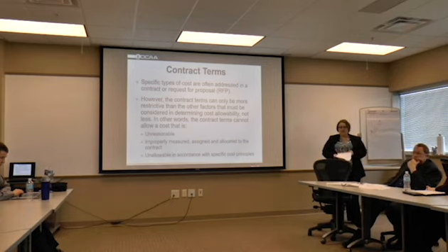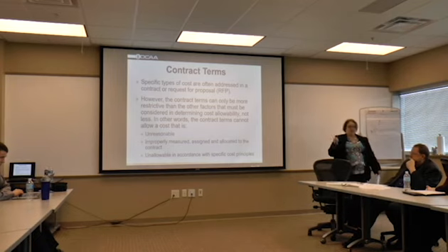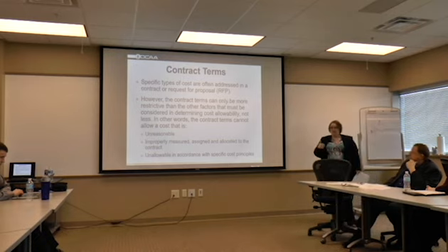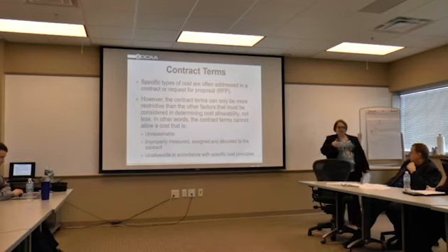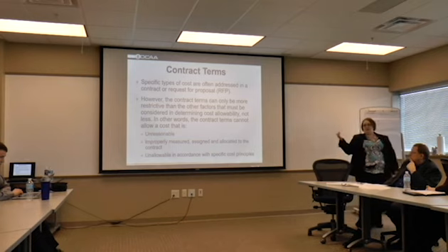Overtime is another one that's pretty common. It'll specifically say how much overtime is available or allowable. I've worked with a contract for years, actually, where that was modded several times. Each month it was monitored, and it was modded to increase that overtime based upon the requirements of the contract.